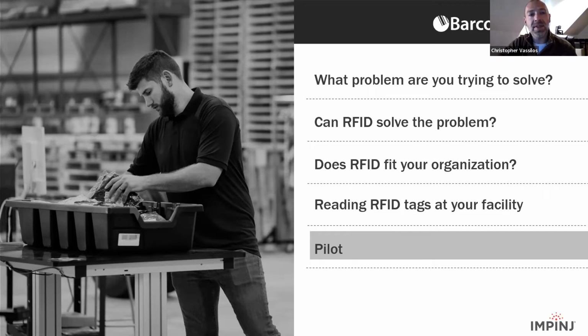We still advise in many scenarios that there's a pilot, because we also find that in a large organization, we always want to make sure that everything goes well, and so many things don't present themselves until the system is deployed. So a pilot phase would be something where perhaps there's multiple locations, or there could be a very large investment. Perhaps you have a facility with 100 dock doors, but a pilot phase would be for 5 dock doors. And perhaps we're just going to start by making sure that just the FedEx trucks are tracked as a pilot to really prove this out, test it, kick the tires, and make sure that anything that is exposed that we might have missed, especially for larger investments.